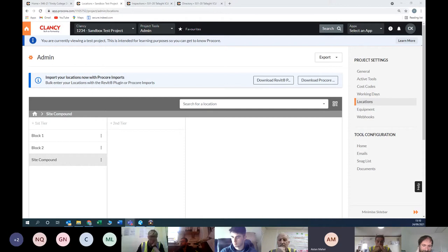Even on a project that we're on, we're using the QR code. We've actually given it to the door manufacturers. So we're using Carl Joinery for the doors. When they have the door manufactured with all the ironmongery that we're adding, we're getting them to add the QR code in the factory. They take a photo of it showing that all the ironmongery is on, and that's their part of the bargain done.